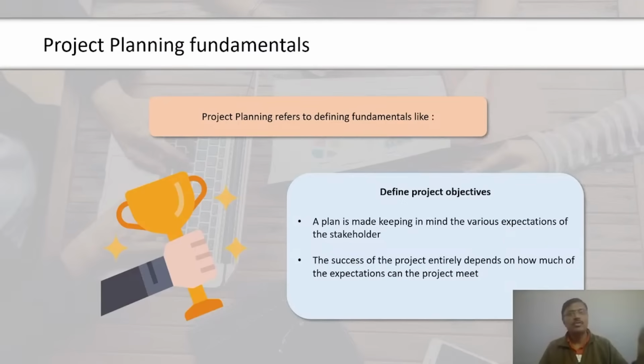Quality audit is a process to check whether the project is complying with the organization policies, standards, and procedures, and determine whether these policies, standards, and procedures used are efficient and effective. So a good audit not only looks at this compliance, but also for new lessons learned from the current project that can help make the future projects better.